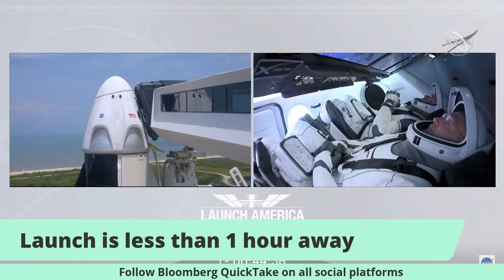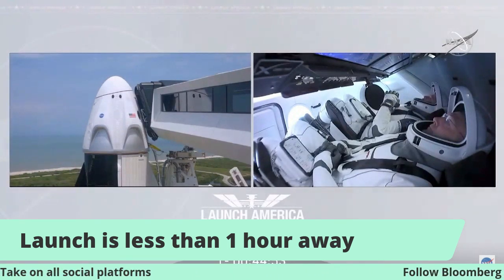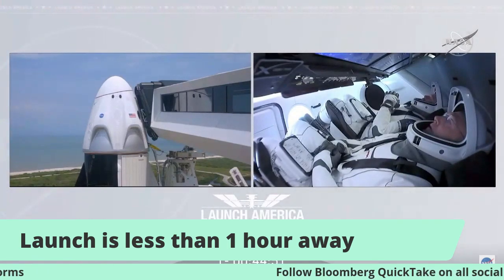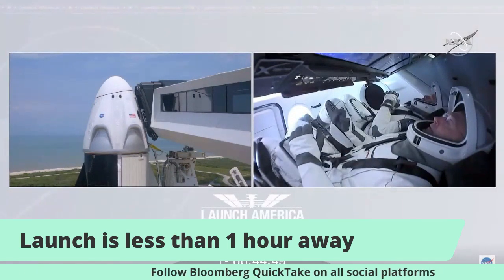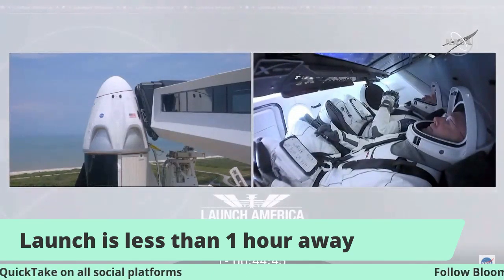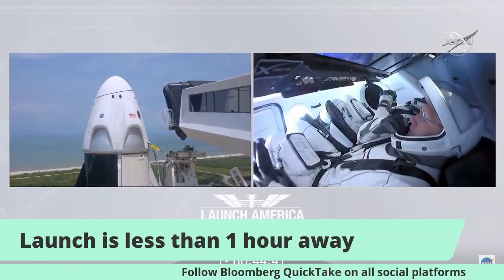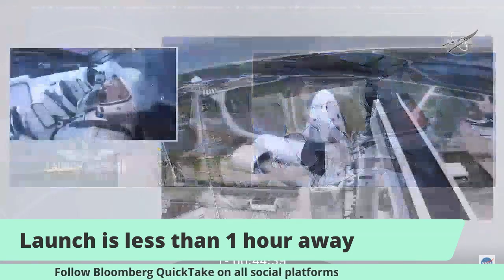T-minus 45 minutes and counting. Reminder on hold and launch escape protocol. For non-urgent no-go conditions, brief the CE or LD, and they will approve aborting launch auto sequence and proceed to launch abort. For urgent issues affecting the safety of the operation, operators shall call hold, hold, hold on the countdown net. Launch control will immediately abort the launch auto sequence and proceed to the launch abort auto sequence.